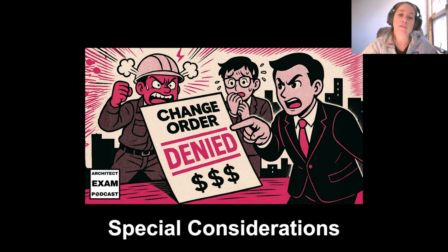That might result in fewer claims for coordination issues, and maybe there's a different pattern of claims related to the project because of the project delivery style. There's also the CMAR, the Construction Manager at Risk project delivery method, which involves a shared responsibility during the design phase with the builder and the designer, which may reduce claims but creates a complex responsibility matrix between the parties.